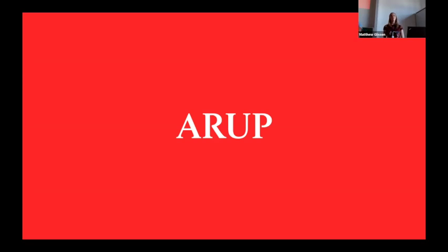Yeah, I think carbon could be given a much more prominent place. There is one example that I'm aware of from a company in England called Anglian Water, where they did an experiment, and I can't remember how long, but they procured on carbon, embodied carbon, rather than on price. And they did get big carbon reductions, I think around 40%, through innovations that came out from the supply chain. And they also had cost reductions.